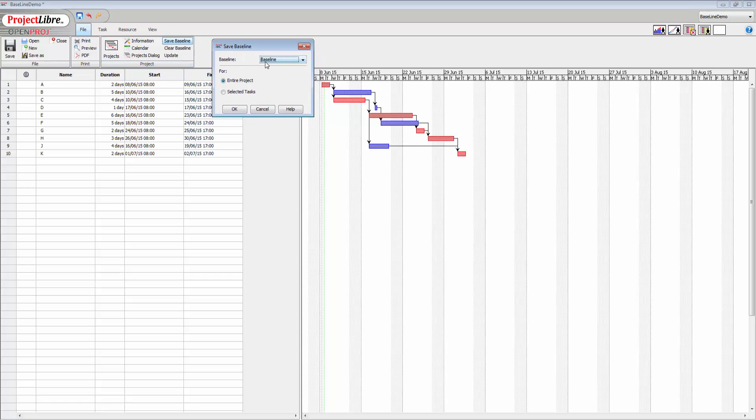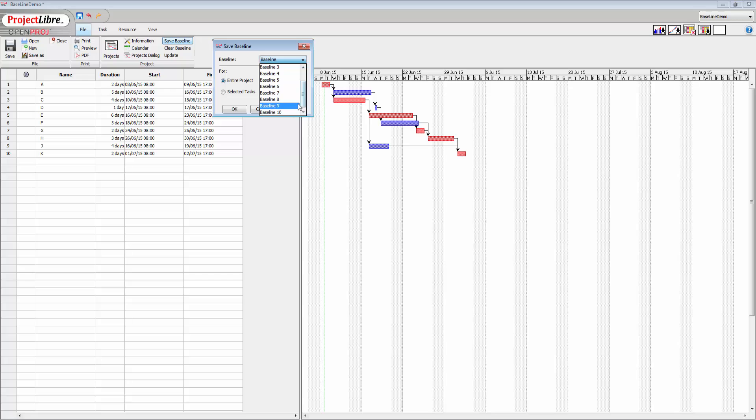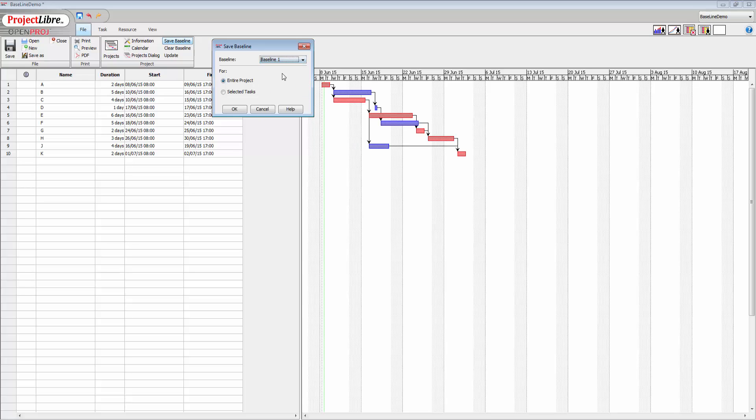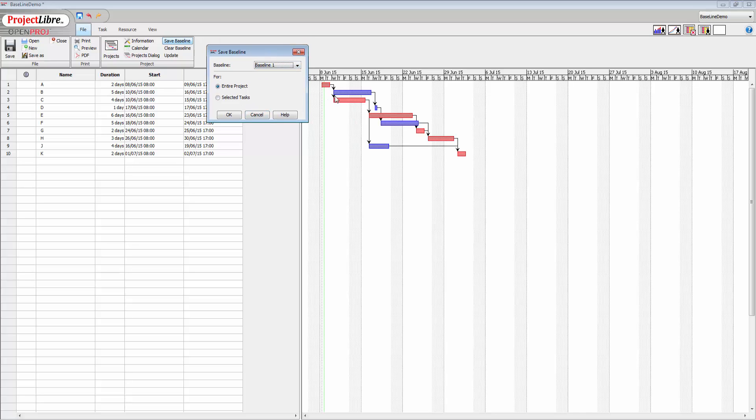So we have baseline and we also have these ones here. In total, the system will hold 11 baselines: baseline with no number and then 1 through 10. So I'm going to just go for baseline 1, and I'm going to apply this to the entire project and click OK. Now when I do that, what you'll see happen is a magenta line will appear under here which will show you what that baseline values are.